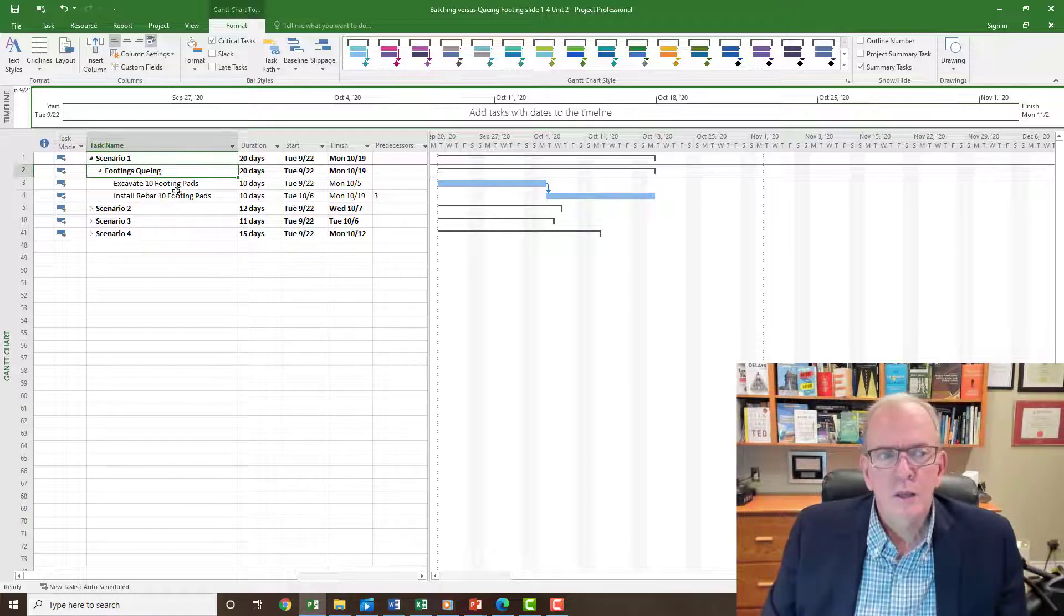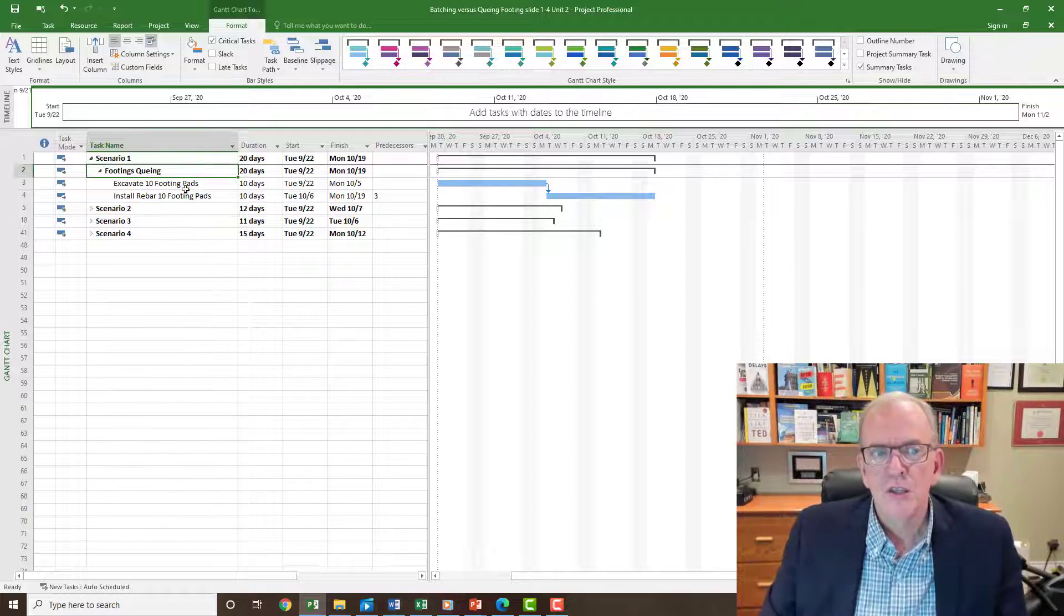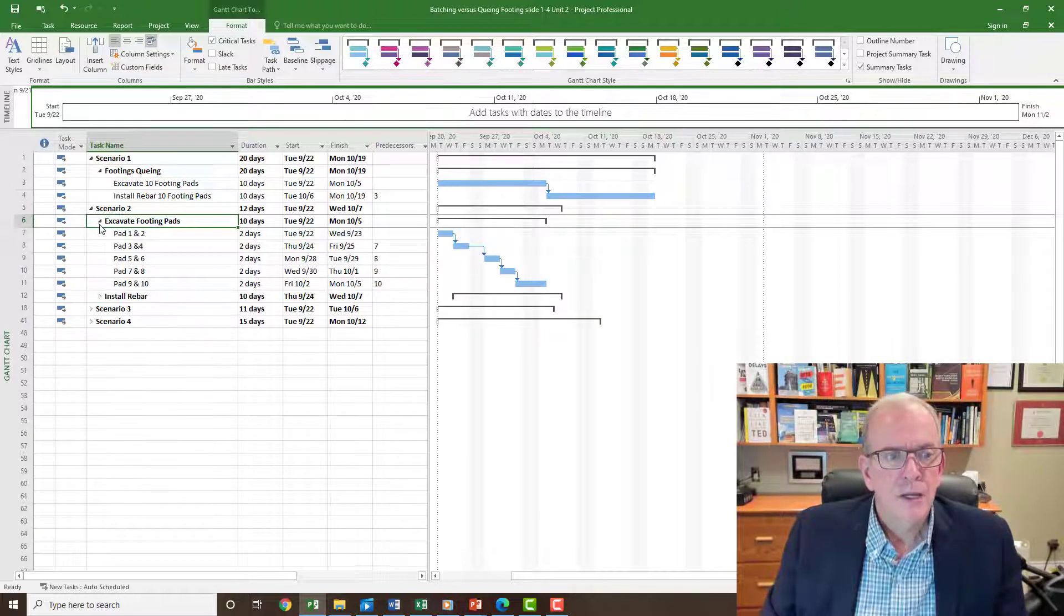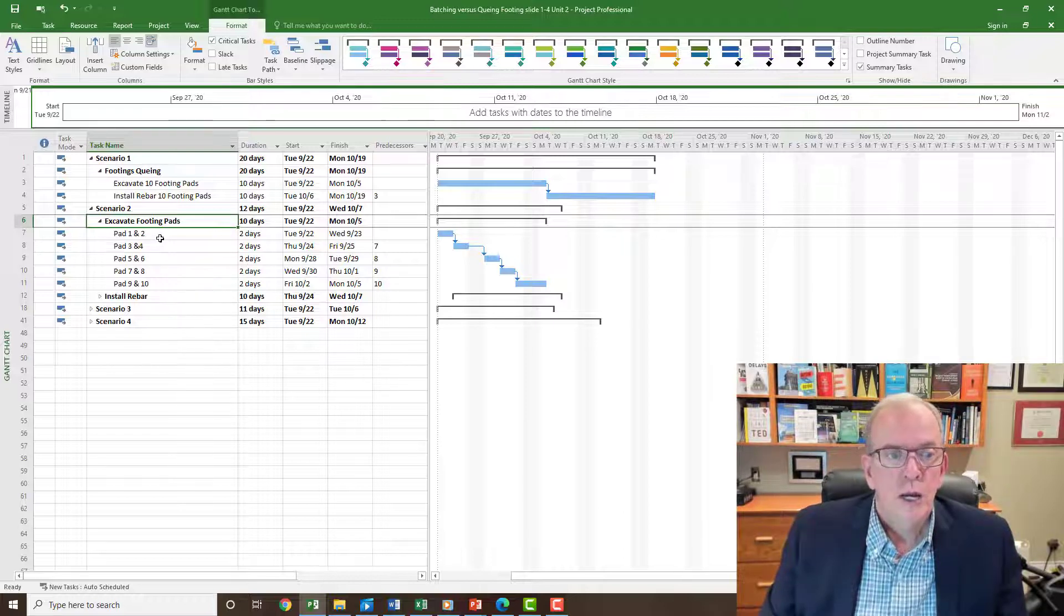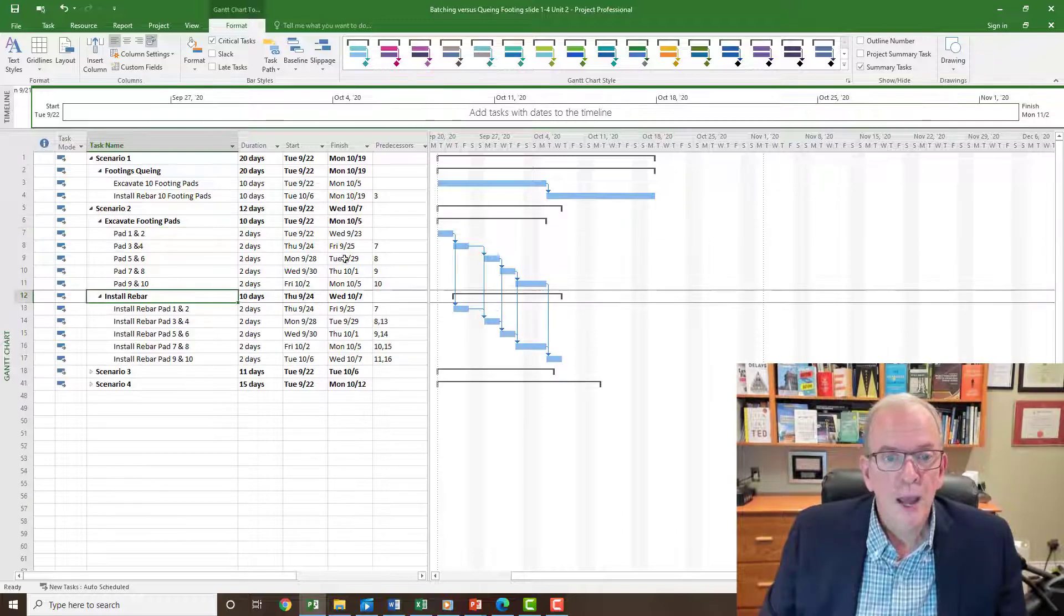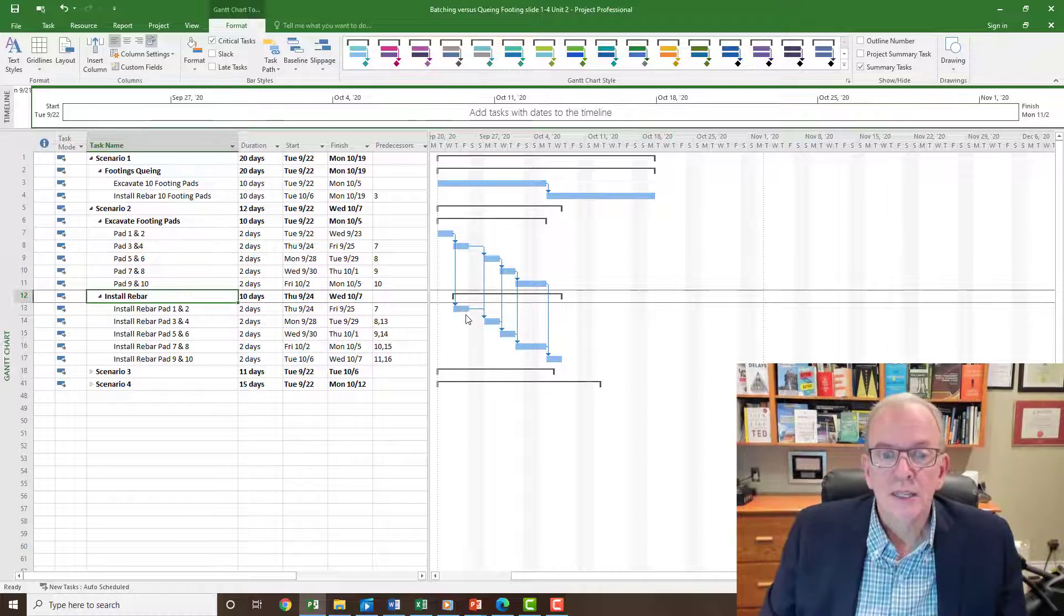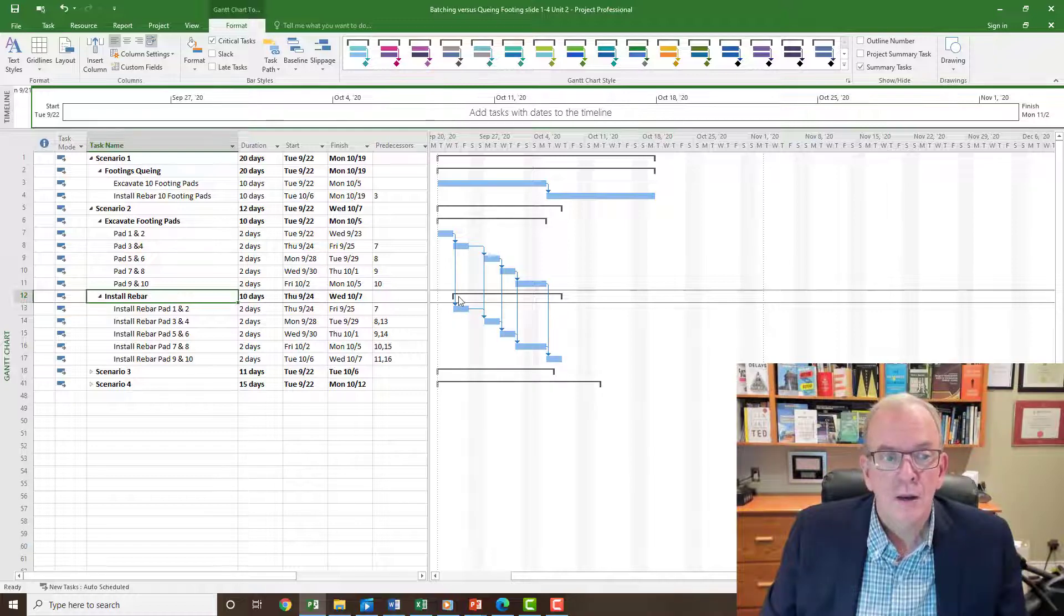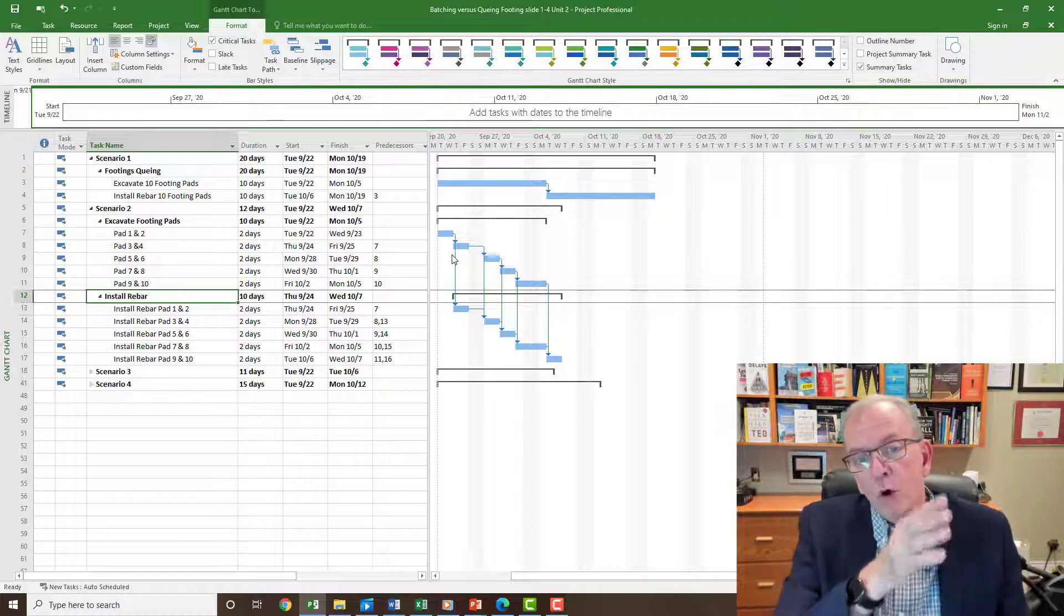So then you got to ask yourself, well what if we could do it with smaller batches? Let's try scenario 2. So we're going to excavate footing pads and this time what we're going to do is we're going to do two pads per day. And once those two pads are done, the rebar installer is going to start to install it the next day on those two pads, so they're really just waiting that two days there before they start.